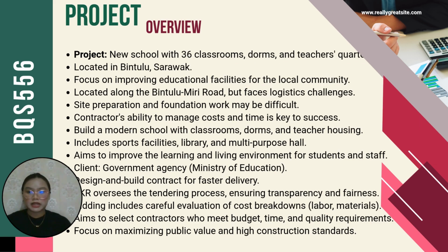The client is a government agency adhering to guidelines from the Ministry of Education. The project aims to improve public education with modern facilities. The Public Works Department, JKR, manages the tendering process, ensuring fairness and transparency. A design and build contract has been chosen, allowing the contractor to handle both design and construction. This approach ensures smooth coordination. JKR oversees the tendering process, evaluating bids to ensure the contractor has the required experience, resources, and offers fair pricing.